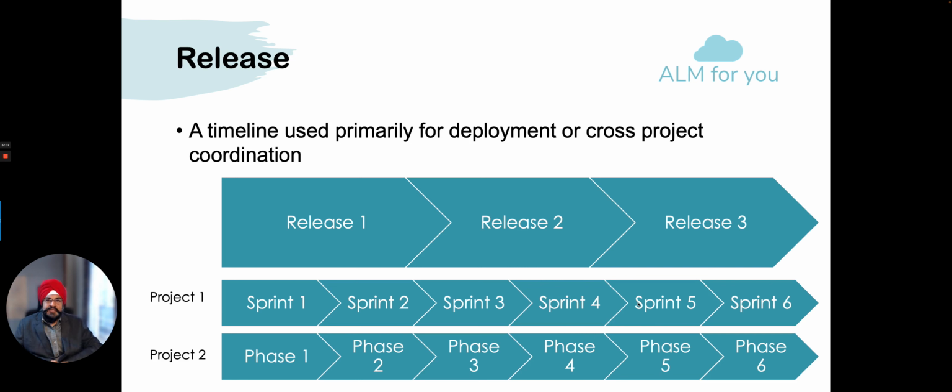What is a release? First of all, again, you do not have to use it. You use it only if you need it. The most typical scenario is when you have multiple projects running with multiple heartbeats or even different methodologies. And then the PMO office wants to ensure certain key events such as integration testing, common deployment, and things like that. So there, the release manager can create a central schedule which then can be published to all the projects.